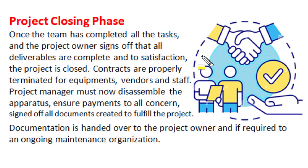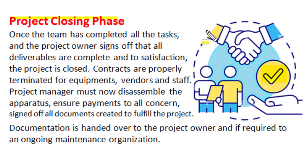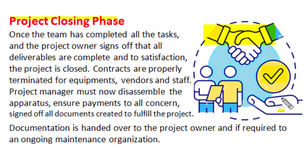Once any team completes all its assigned tasks and the project owner signs off that the output or deliverables are complete and to the satisfaction of project guidelines, that part of the project is treated as closed. In the project closing phase, the contracts made for project execution are properly terminated for all equipment vendors or working staff members. The project manager must disassemble the apparatus, ensure payments to all concerned, sign off all necessary documents, and hand over those documents to the project owner. If required, these documents can be handed over to the ongoing maintenance organization for that project.